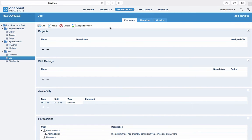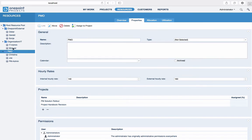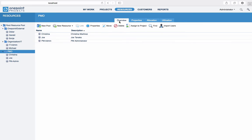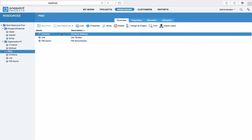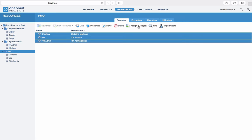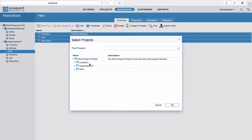In order for a project manager to plan resources in a project, you will first need to assign these resources to the project in question. To assign a number of resources or pools to a project, simply select several resources at the same time, click on Assign to Project and select your project.